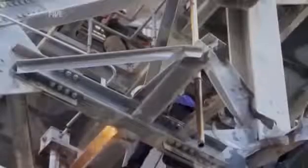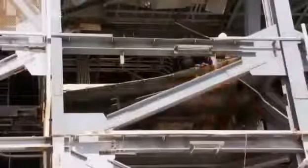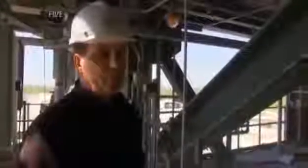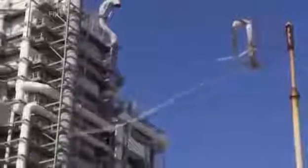The floors also served another purpose, helping to stabilize the launch tower from high winds. Once they're gone, the team will have to work around the weather or risk being blown from the tower. It's still all about the wind. We're watching the weather now. We've got hourly forecasts up through Thursday. So we keep watching the wind, and we're also watching the longer term potential for tropical storms. You have to be aware of it.